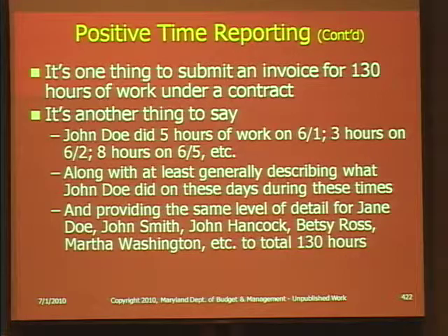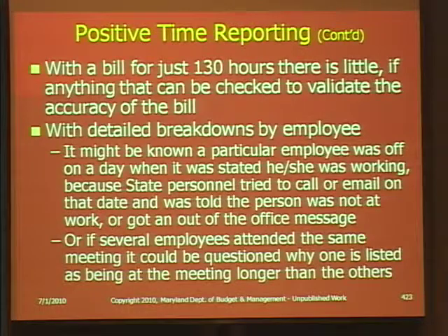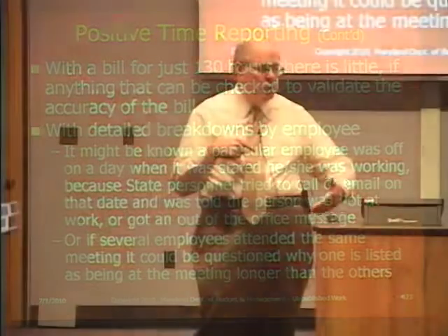Betsy Roth, Martha Lewis, Washington. I've heard of those people. With a bill for just 130 hours, there is little, and that's just an illustration, there is little, if anything, that can be checked to validate the accuracy of the bill with detailed breakdown by employee. For instance, if you're the contract manager for the state, and if you've kept your log, you might know that you made a call to a specific employee of the vendor on a specific day, and he's on vacation, or he was out in a meeting the whole day, and you noted that you made a phone call and couldn't get the person because they were out.